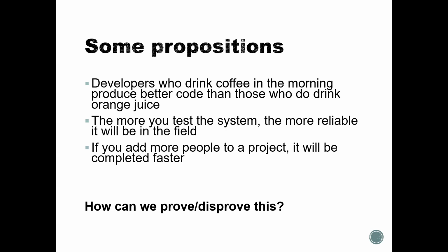It is possible. But if we think that by putting in more people we can actually make the process fast, then one can put 300 people in a team and assume the next day we can complete the task. So it's not like you can put in any number of people and make the process fast. Putting 300 people in a team and expecting the project to complete the next day is something beyond our imagination, or it is not something which can actually happen.